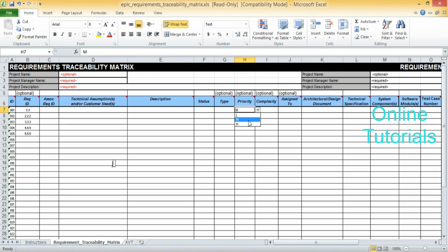For example, if priority is medium and high, what will you do? You will address it first. Right. If priority is medium and high, you will address it first. If it's a low priority and complexity is high, you don't do it. Low in complexity also, you don't need to do much, because it is not in priority. So you give first preference to the priority rather than the complexity. Even though it's high in complex nature, if it's a high priority, you address it first.